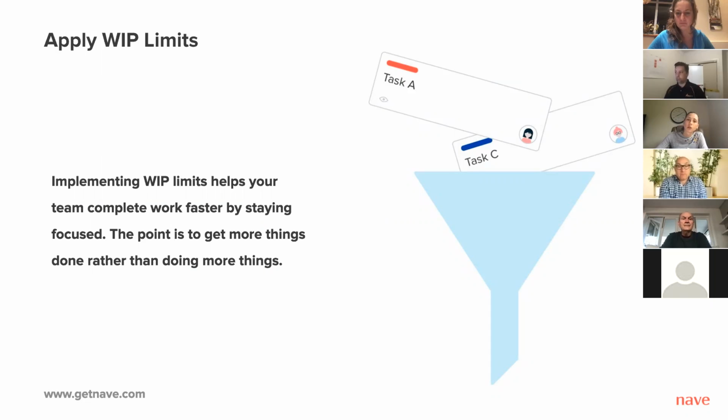Using the Kanban board alone isn't enough to support a smooth and efficient workflow. Your processes can still get stuck if there is too much work in progress, also referred to as WIP. Too much WIP leads to this, and your team will be forced to constantly switch the context, trying to handle all work at once. Constant context switching is not effective, and it comes with its cost. In fact, it's estimated to cause at least a 10% penalty per switch. Multitasking makes your team members feel busier while delivering less. Too much WIP leads to overburden, poor service quality, and negative effect on your employees' engagement.